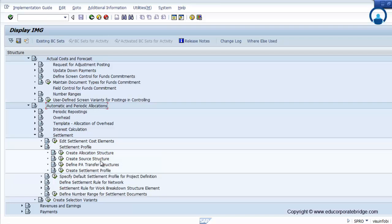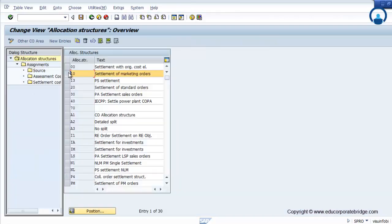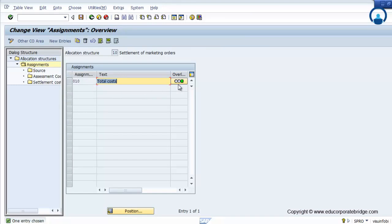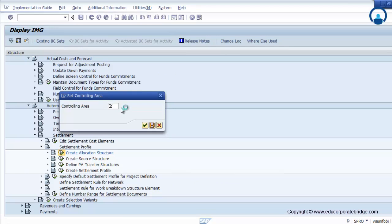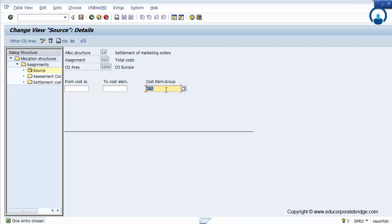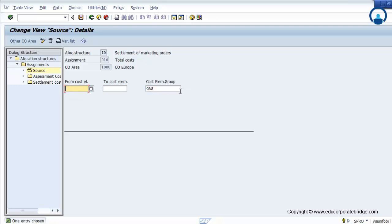The settlement of the project, WBS, or network is done by the finance department and is controlled by the FICO module. But for your knowledge, I will share how to do the settlement. First, create the allocation structure, where you define or assign the cost element. This is the cost element group where all the costs will go.